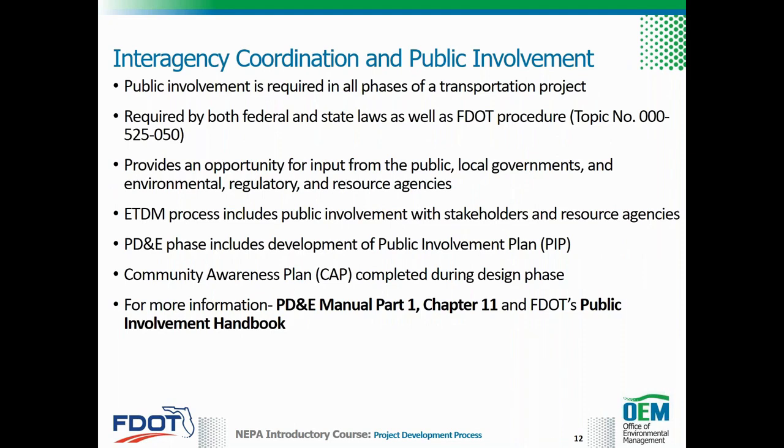Public involvement, which provides opportunity for input from interested and affected members of the public, local governments, and environmental, regulatory, and resource agencies, is required in all phases of a transportation project. The public involvement effort should be scaled to match the magnitude or complexity of the project, including potential project issues and challenges of a project, such as potential controversy, right-of-way acquisition, relocations, and access modifications.